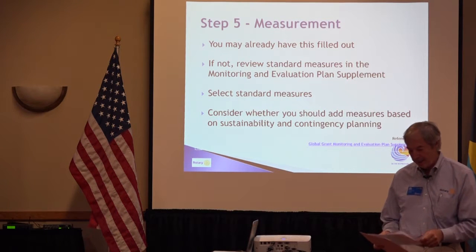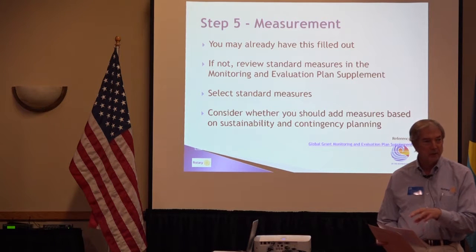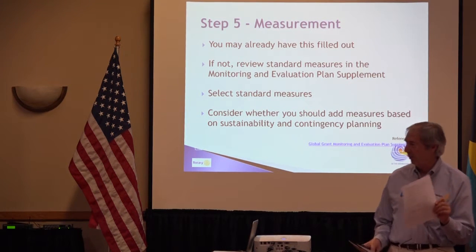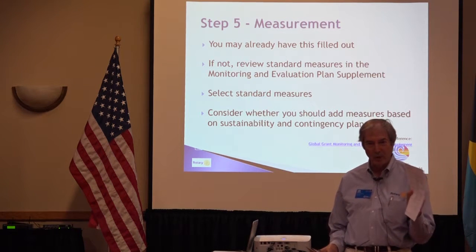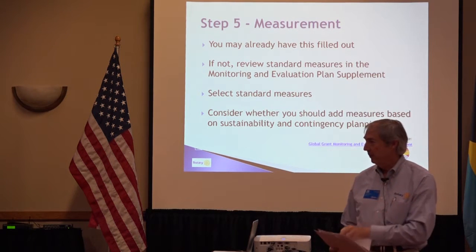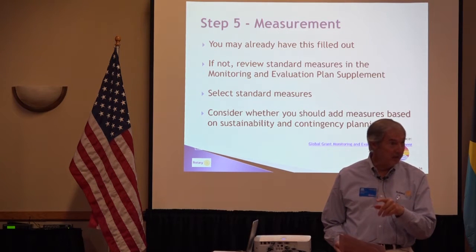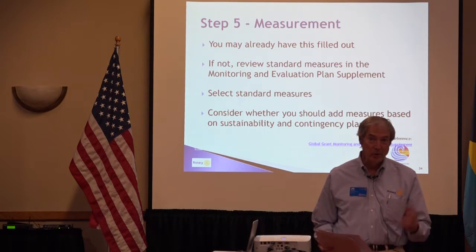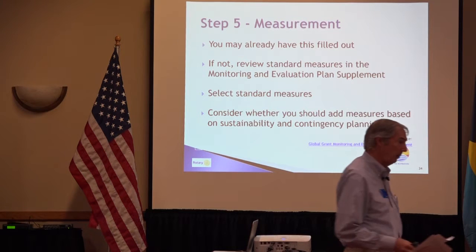And if you look on the back side, it talks about the definitions of the different data collection methods. So it's pretty straightforward. You're going to pick some of these. You're going to pick the way you are going to measure it, and you say what your measurement target is. You can say, we plan to build 100 wells. Our target is 100. We're going to count how many we do. It's going to be direct observation because we know how many wells there are.